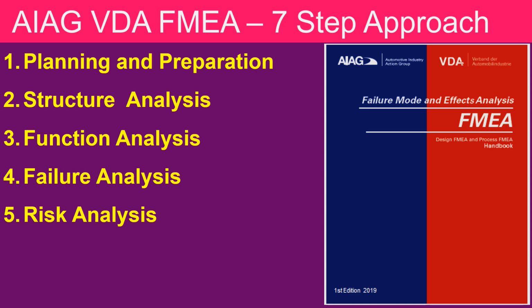The fifth step is risk analysis. The purpose of this step is to estimate the risk by evaluating severity, occurrence, and detection in order to prioritize the actions that need to be taken and assign prevention and detection controls.